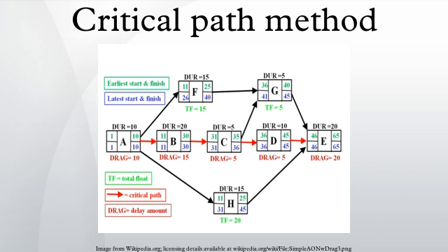Expansion. Originally, the critical path method considered only logical dependencies between terminal elements. Since then, it has been expanded to allow for the inclusion of resources related to each activity, through processes called activity-based resource assignments and resource leveling. A resource-leveled schedule may include delays due to resource bottlenecks, and may cause a previously shorter path to become the longest or most resource-critical path.